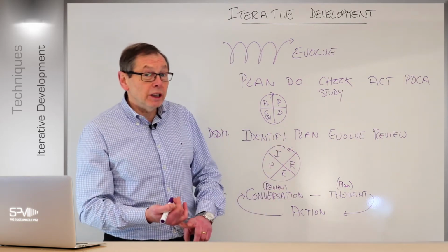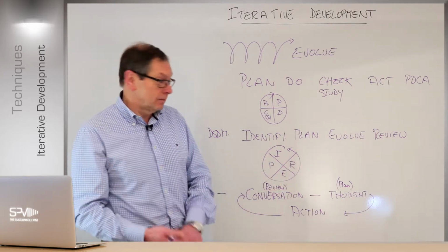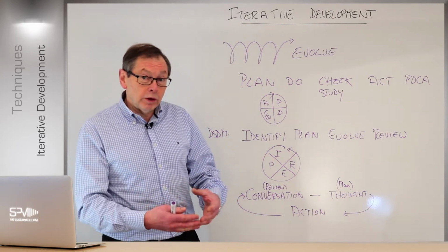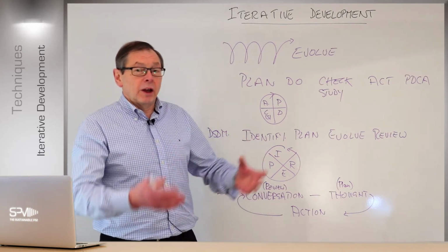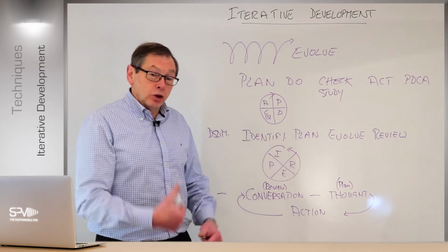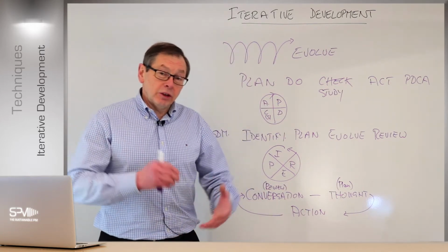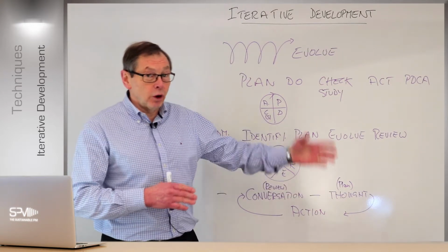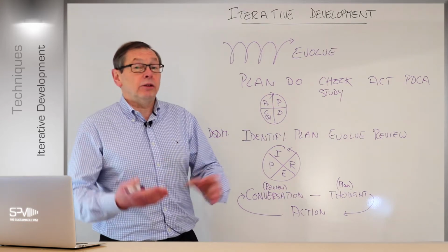It's working functionally. So always a good idea to test. So in the action is always a test process. Test it, make sure it functions from the build point of view. Go to whoever's going to do the review for you, and see how they like them apples so far. If it's good, get on and do the next iteration. If you want any changes, this is brilliant because we can put that change into place. Yeah, it may have an impact on the overall time frame to deliver that. So if you've estimated 3 days, it may take 3.5.